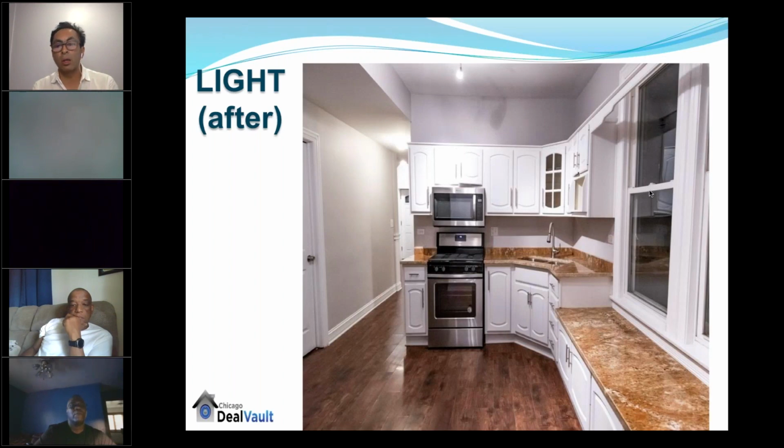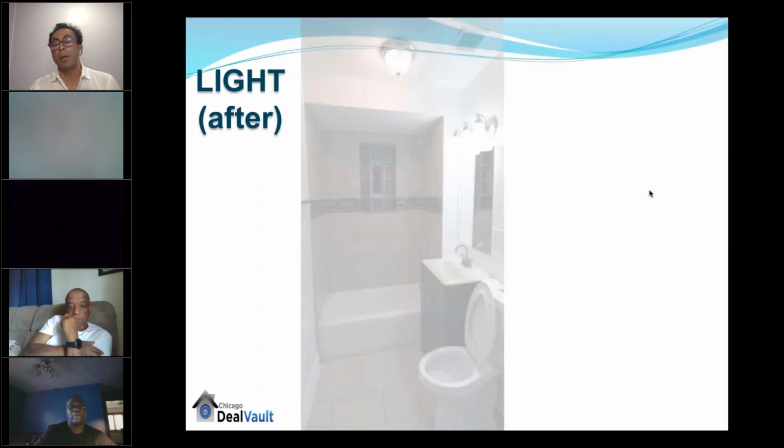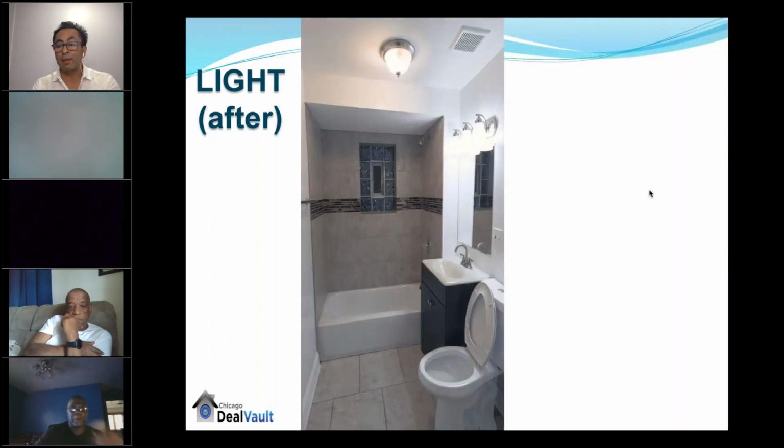We didn't put any countertops. We didn't do any faucets, none of that. All we did was paint the cabinets and put in new appliances. Okay, super, super important for you to understand, because the minute we need to update the bathrooms, meaning put in a new vanity, new tub, tile, and so forth, it's not a light rehab.